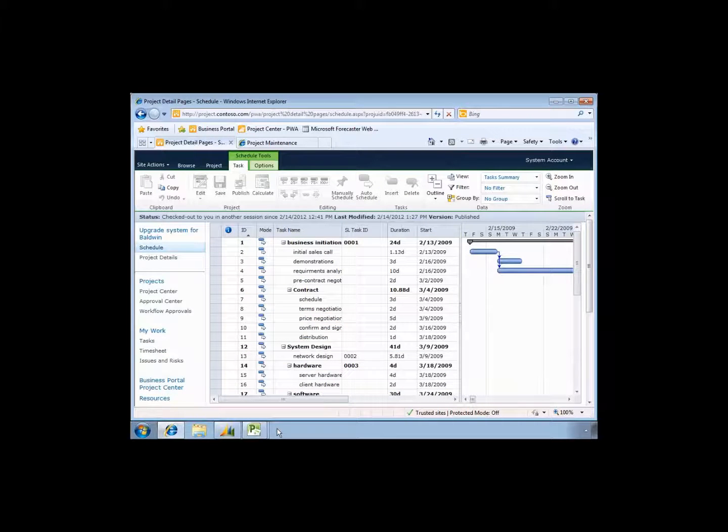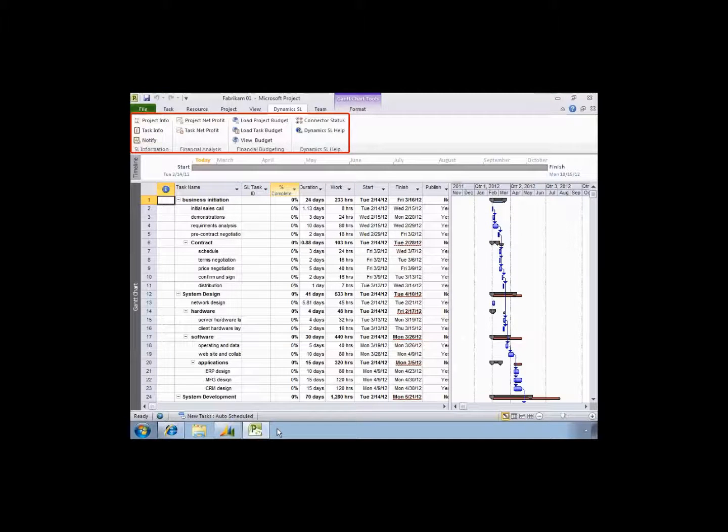Right. Now, as I was saying, with most of the people that are project type of people, the project managers live and breathe in a tool, usually Microsoft Project. In this case, we're using Microsoft Project Server. The big advantage of the server version is that if we're in a company where we're all sharing resources, we want all these projects stored in one location. So if I assign somebody a resource, I know that they're not on any other projects, and I'm getting a true to life view of what's going on with this project.